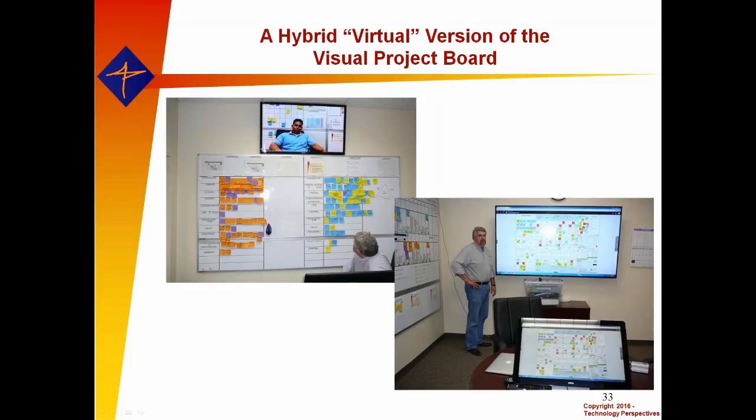What tool do you use to allow or disallow scope creep? Oh, I use what's called staged freezing. This is something that actually Don Reinertson wrote about back in Managing the Design Factory, and even earlier, I think, in Developing Products in Half the Time. I have a design review set of events, and I use every design review, and I have several of them. I typically will do an early concept review, we'll do a detailed design review, a launch to production or final design review. Each one of these, we put a freeze list associated with the event.